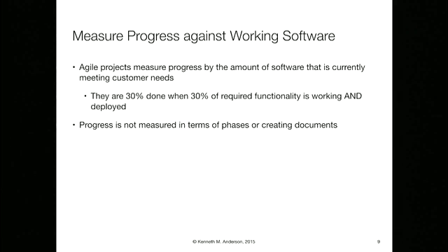life cycle, in which, let's say, there's 4 major sections. There's requirements, design, implementation, and you include testing and implementation, and then you have your deployment. Right? So with waterfall cycle, if you finish the design phase, you're 50% done. But you haven't written any software yet. Right? So there's no system, but they would claim they were 50% done when they actually weren't done at all. They didn't have anything for that work, in terms of working software.